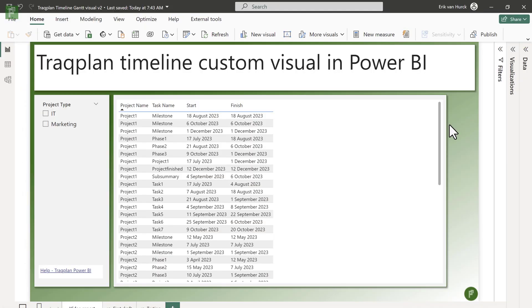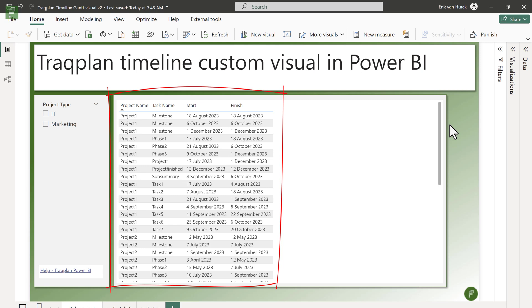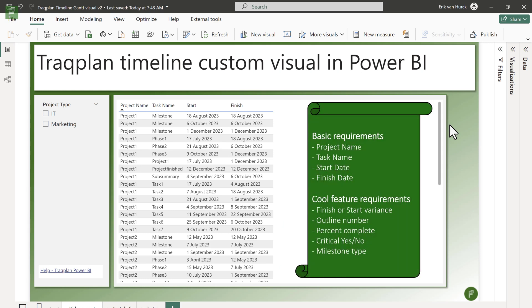The TrackPlan Timeline visual, just like any Gantt chart visual, basically only needs a couple of values. So you have your project name, your task name, your start and finish. But there are options to do additional things such as including baselines, including if a milestone is critical or not, or maybe the types of tasks. You could even include a program value.